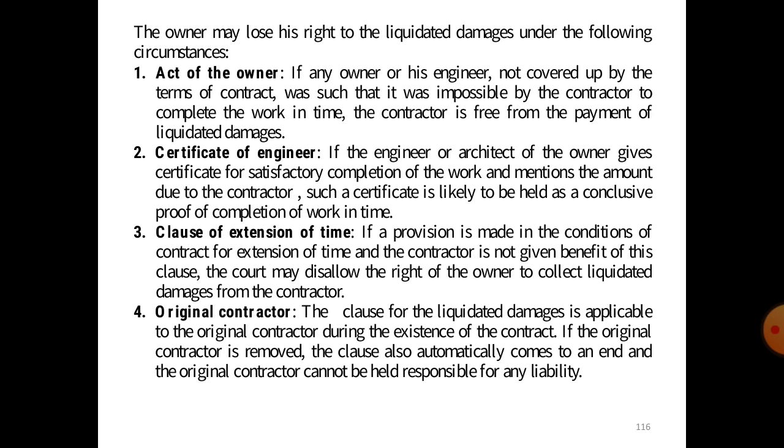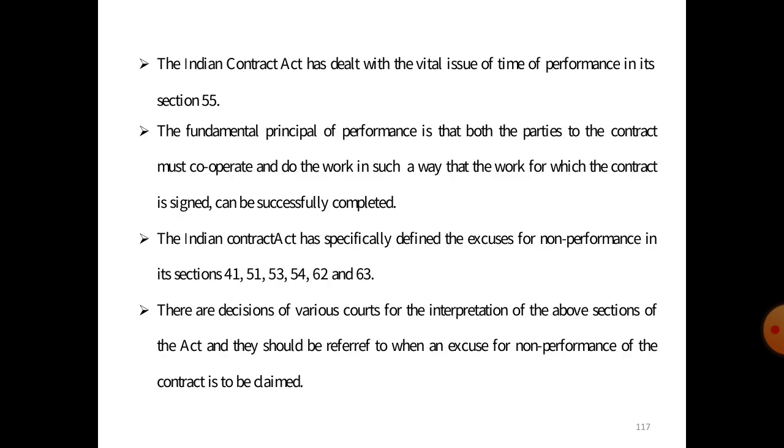And the fourth circumstance is that liquidated damages are applicable to the original contractor during the extension of the contract, and if the original contractor is removed, the clause also automatically comes to an end, and the original contractor cannot be held responsible for any liability.